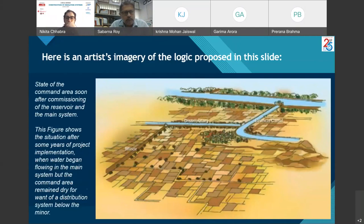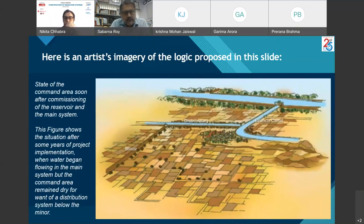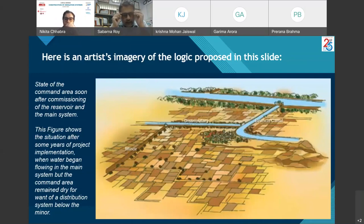This slide shows the state of the command area soon after commissioning of the reservoir and the main system. The figure shows the situation after some years of project implementation, when water began flowing in the main system but the command area remained dry for want of a distribution system below the minor.